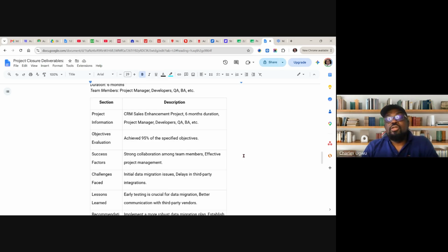So, and all these, you see, if you have been doing what we call lesson learn meeting every week, which I said that lesson learn meeting should be kind of statutory meeting every week. If you are documenting all these lesson learned every week, by the time you are going to complete this project, you must have documented a lesson learned log, a lot. You must have logged a lot. And all you need to do is refine them, and it becomes your lesson learned document.